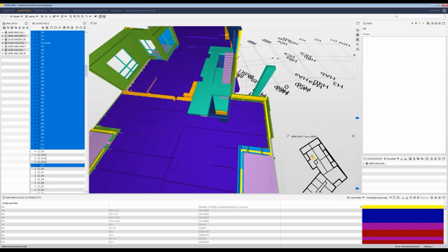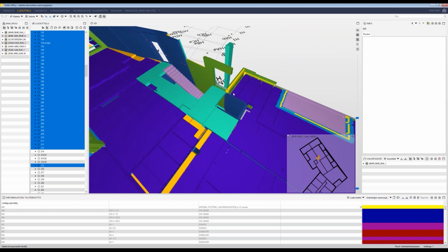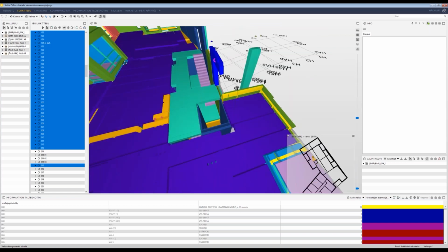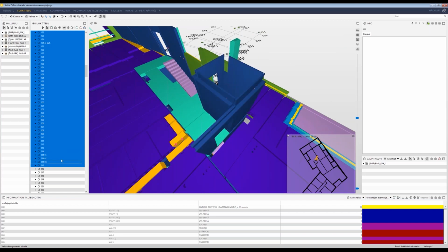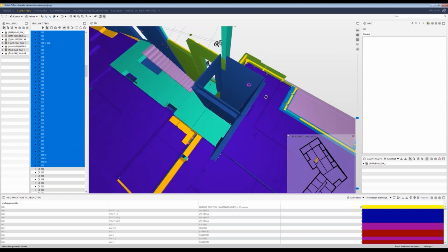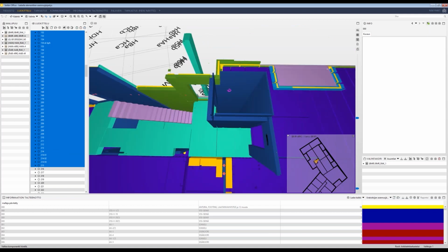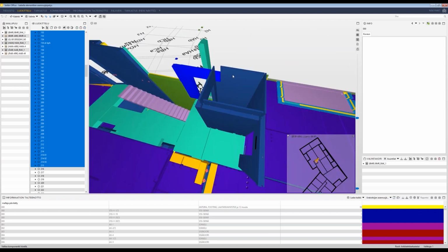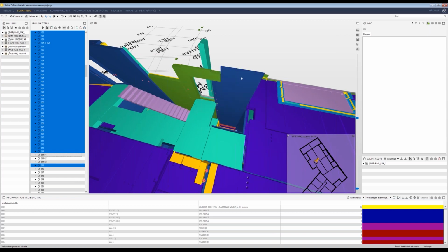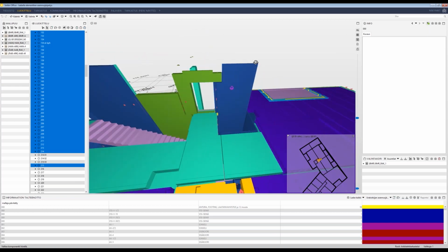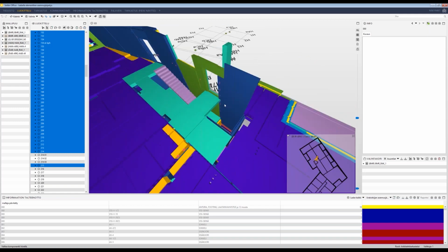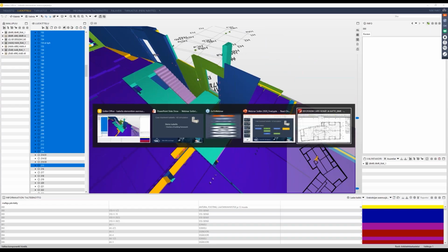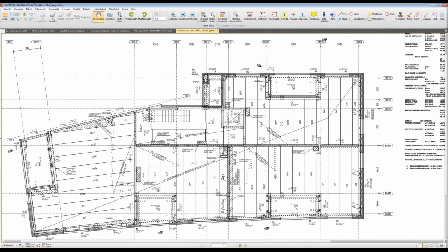In this case, we can see that this wall part cannot be installed before the hollow core, I mean, the elevator core walls, because this one sits on top of this one. These kinds of things we could grasp during the workshops, and I can just show you how it looks in the pictures in the design documents.